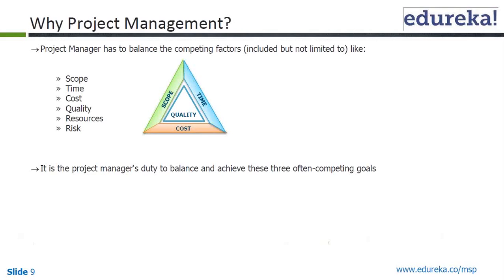Those are the things that need to be avoided, and that's where your project management skills come into the picture. That's where you need to tell the customer, yes, we can do it, however, it needs to go through the change request process. The integrated change control process is what you get in your project management processes, right? So it needs to pass through the perform integrated change control process so that all the factors are taken into account and the experts are consulted before we make that kind of change. So this is one example.